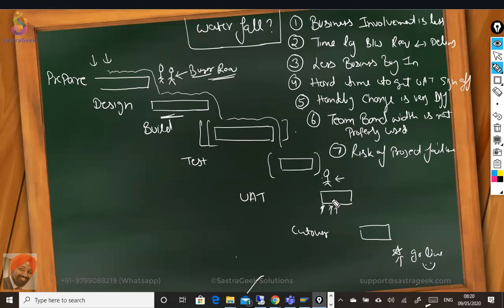It's so high that most of the projects fail. Almost 60 to 70 percent of projects fail. Failed doesn't mean that before going live it gets scrapped. The definition which we have taken from the analysis is: after going live, if after 3 years you see that the product's usage has significantly dropped, earlier when we went live 100 people were using it and now only 20 people are using it, we consider that a failure of a product. Either the product itself failed, or because of the implementation approach, it failed.